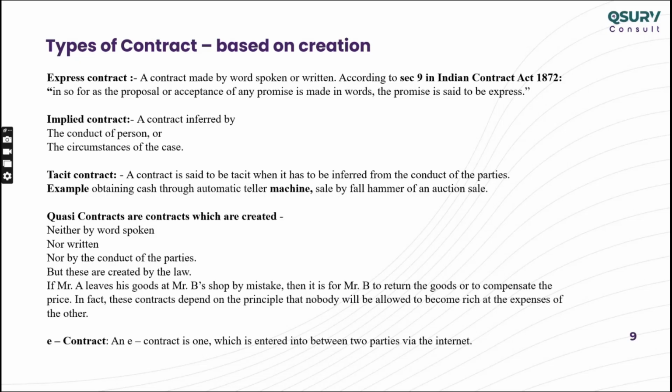So I'll go to the implied contract example. In an implied contract, there's a cost proposal he submitted. Just imagine he's supposed to do some landscaping work in front of your building. He submitted the contract, you haven't approved it, but he starts the work, you are visiting, you are seeing it, maybe you're giving some opinion also, and coming back. But at the end you're telling him, there is no contract, I am not going to pay you. This is where an implied contract is in place. Because I didn't stop him, and given my circumstances, like giving opinions and all, there is a chance.